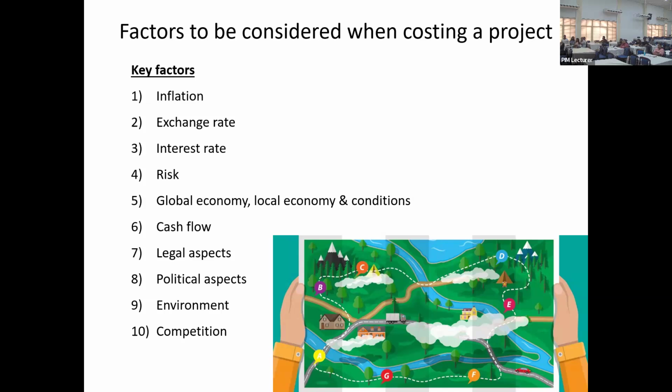So today, the base rate was 7.75. That is the PLR. Put 2% more, let's say 10, you can price at 10%. Now in Sri Lanka, next year, 12 months later, is the interest rate going to go up or down? What do you think? Interest rate is going to go up or down? It's going to go up. How do I know that?